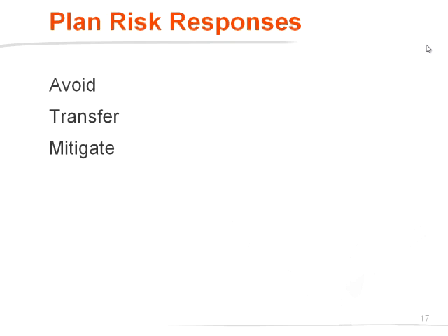But when you use mitigation, the risk doesn't go away. It's just reduced. Maybe the probability is lower, maybe the impact is lower, whatever. The important thing is you have to write down how you want to mitigate it. If you don't write down everything about your risk responses, you cannot evaluate what the effect will be. So when we look at the templates later, we will have a risk assessment before risk responses and after risk responses.